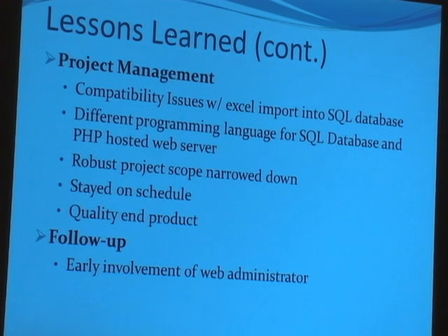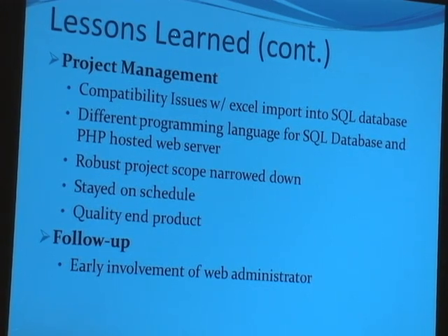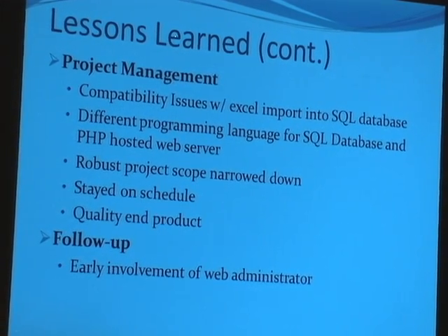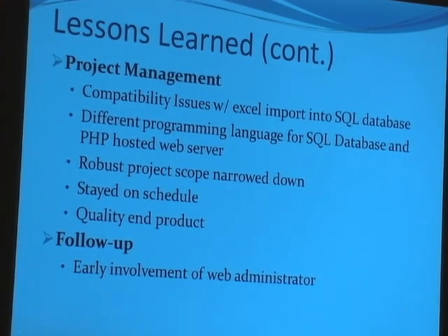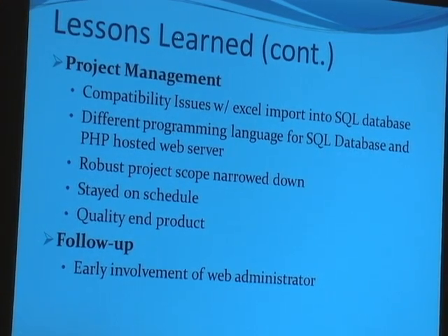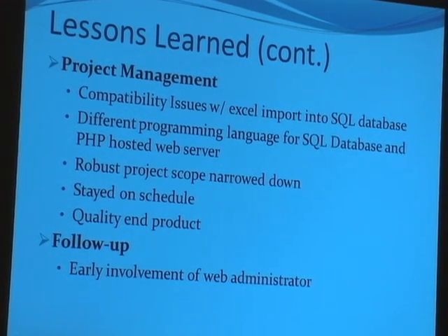Again, we stayed on schedule. As a follow-up to this project, one thing that we would do differently is involve the web administrator much earlier in the project. In fact, probably right off the bat.